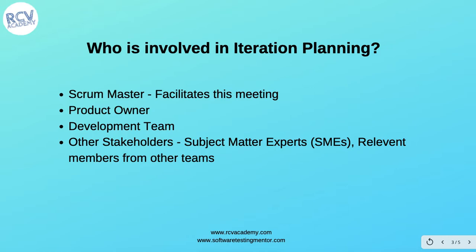Who is involved in iteration planning? The Scrum Master facilitates the meeting, the Product Owner is involved, and the whole development team participates. Other stakeholders such as subject matter experts and relevant members from other teams are also invited if required, but by default the Scrum Master, Product Owner, and development team are always involved.